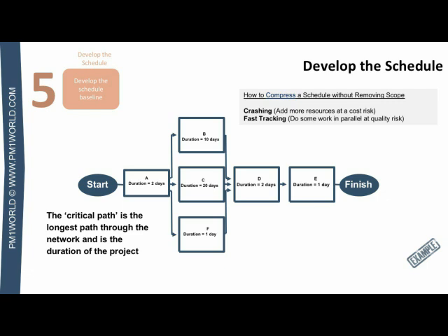So on this diagram that you see on the screen, if you were to add up the durations of the various paths, the paths are the roads through this diagram from start to end, you will discover that the critical path's duration is 25. That is comprised basically of the activities that run right down the center, A, C, D, and E. Those activities are said to be on the critical path or critical path activities.